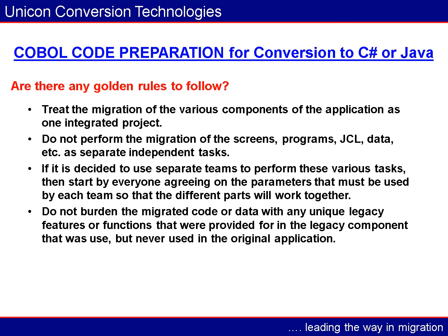The project was grossly over budget in cost and estimated timeframe. We found that the people who were performing the project were highly skilled and highly knowledgeable of the components to be migrated. Major components, screens, programs, JCL, and database were being converted by separate teams. The SQL Server conversion of the old CODASYL network database covered everything that the original database did. It had been an amazing technical achievement, but a very expensive and time-consuming effort.